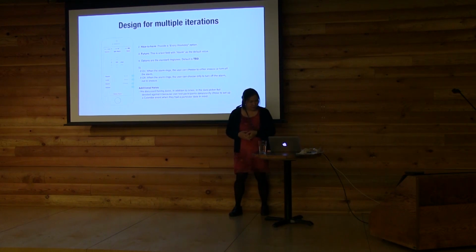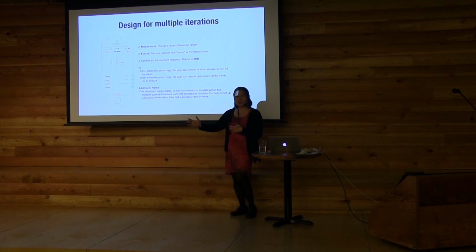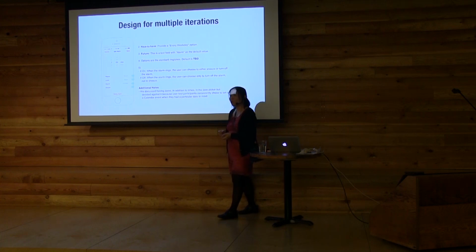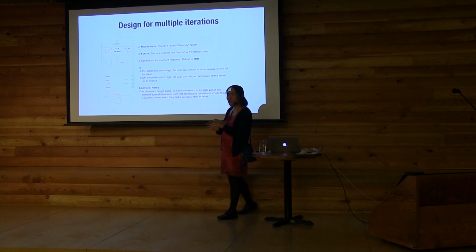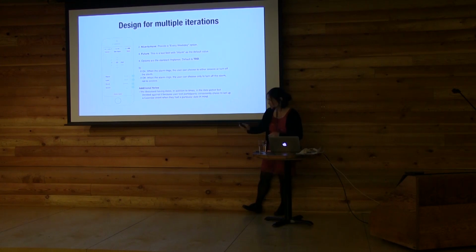So let your designer think ahead. Let them think about what will be implemented in multiple iterations, to get to your end product, your vision, where you want to be. And whatever design specification you have, you can use metadata. Just to show you an example of that: future, nice to have, that kind of thing, details to be worked out later.